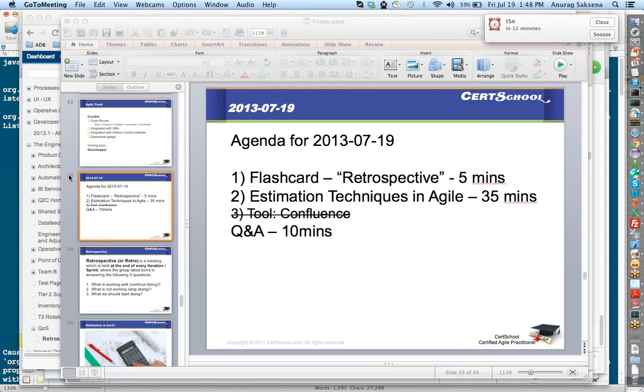Okay, so as a scrum master, you'll be able to see that very quickly. Tracking slippage is virtually what you're trying to track. If there is a certain story that was supposed to be done by a certain date, but it is not done by that date, or it is at risk of being finished at that date. So what you're looking for is if there's a story that is at risk right now. And with the burn down chart, if you have the remaining time of every story correctly, to the most accurate figure, you would be able to track it very quickly.